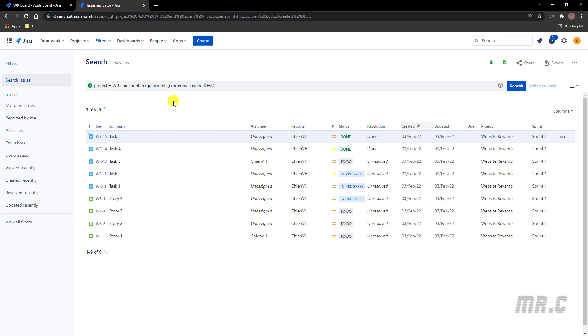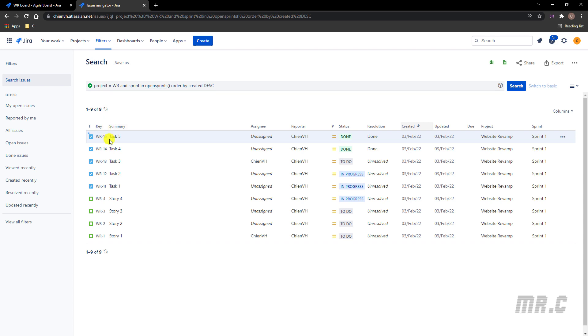So when you are using the OpenSprint function in the query, that means you want to just filter all of the tickets that were assigned to the sprint. And that sprint was started but had not been completed here. And so now I have Sprint 1 in active. That means when you execute this query, it will only filter all of the tickets in Sprint 1.